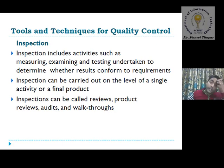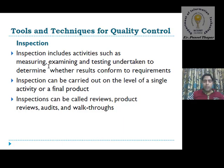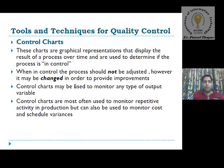Tools and techniques for quality control include, first, the inspection tool. We check and control quality through inspection. Inspection includes activities such as measuring, examining, and testing to determine whether the result conforms to requirements or not. Inspection can be carried out at the level of a single activity or the final product, and can also be called a review, audit, or walk-through.